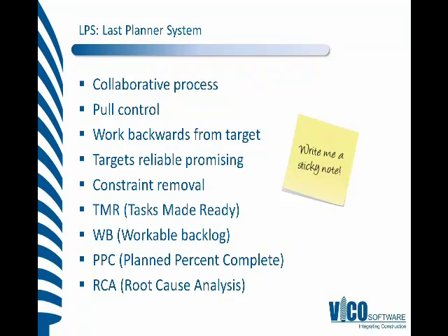In the sessions that we hold, we're removing constraints in order to make the work ready. So tasks made ready, TMR, is an acronym that we use to describe a task that is now ready to start, with no prerequisites and no constraints that haven't been removed. Essentially, that is something we could start tomorrow without any problem.